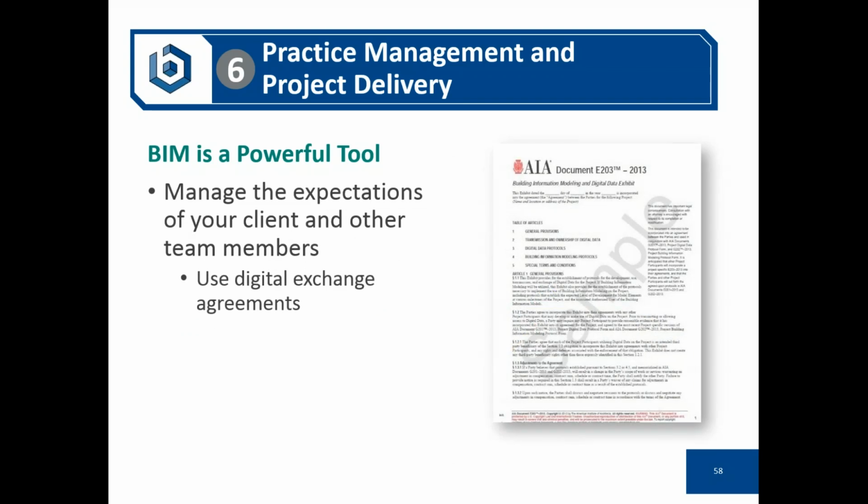Quick word about BIM, again, subject of a separate workshop, but you really need to manage the expectations of your client and other team members over the use of this powerful tool. AIA has some very robust documents, the E203-2013, and the guides that go with it, and the forms, protocol forms that go with it as well.